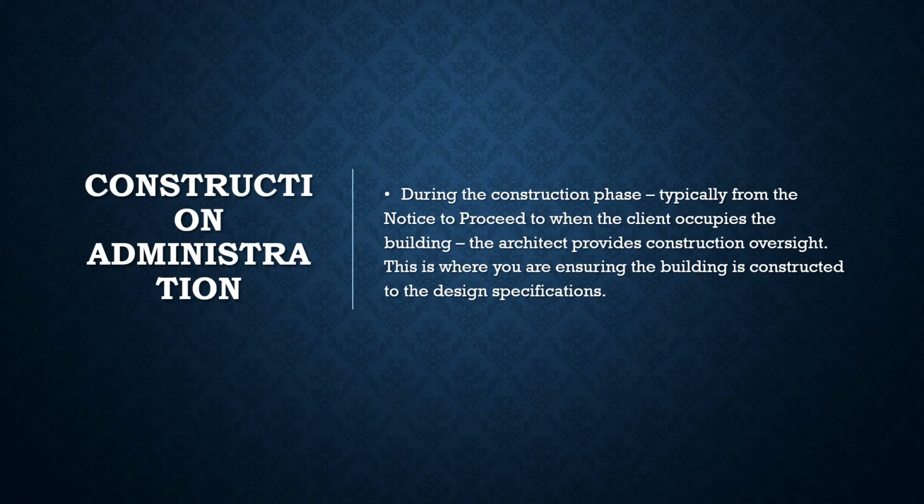Construction administration. During the construction phase, typically from the notice to proceed to when the client occupies the building, the architect provides construction oversight. This is where you are ensuring the building is constructed to the design specifications.